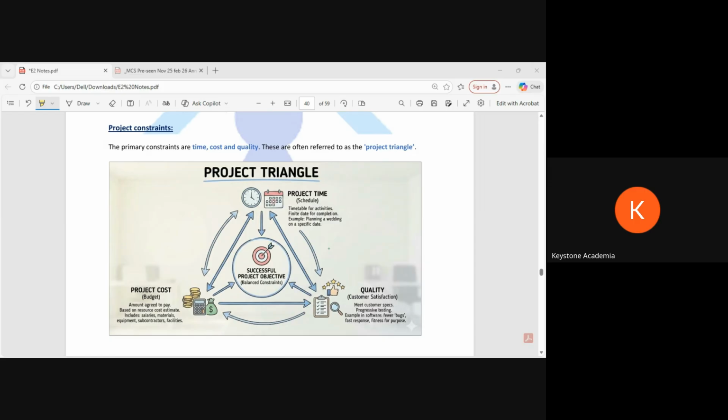That will also be costly. And when we are rushing to get that, we might not do a proper quality check or the number of controls we usually do. Then this can affect quality also, isn't it? If you just think about the time and agree, then we are affecting the cost and the quality. Maybe we are not getting the margins we expected.